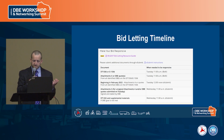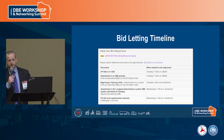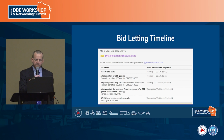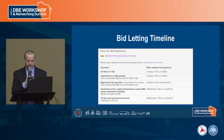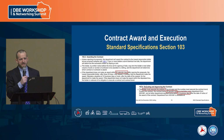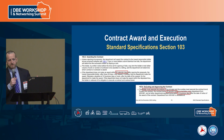So second Tuesday, submit your bid information through BidX. I talked a little bit about the DBE information. There can be some back and forth on that DBE information that's submitted, depending on whether the goal is met or if there is a good faith waiver request that's being put in. That process is really managed by our OBEC and DBE groups, so they'll be in contact with you about that information, and then we'll move into the award and execution phase if you're the low bidder. Once we get to that point, the department will award the contract within 30 days or a mutually agreed extension.